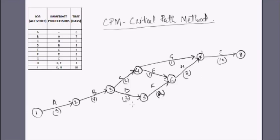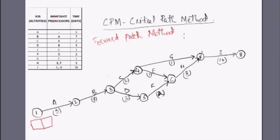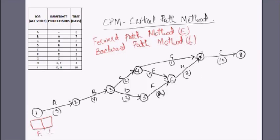Next, we will use the forward and backward pass methods to find the project completion time and identify the critical path. The forward pass method starts from the first node and we proceed in the forward direction till the last node. Using this method we calculate the earliest occurrence at each node, and using the backward pass we calculate the latest occurrence at each node.